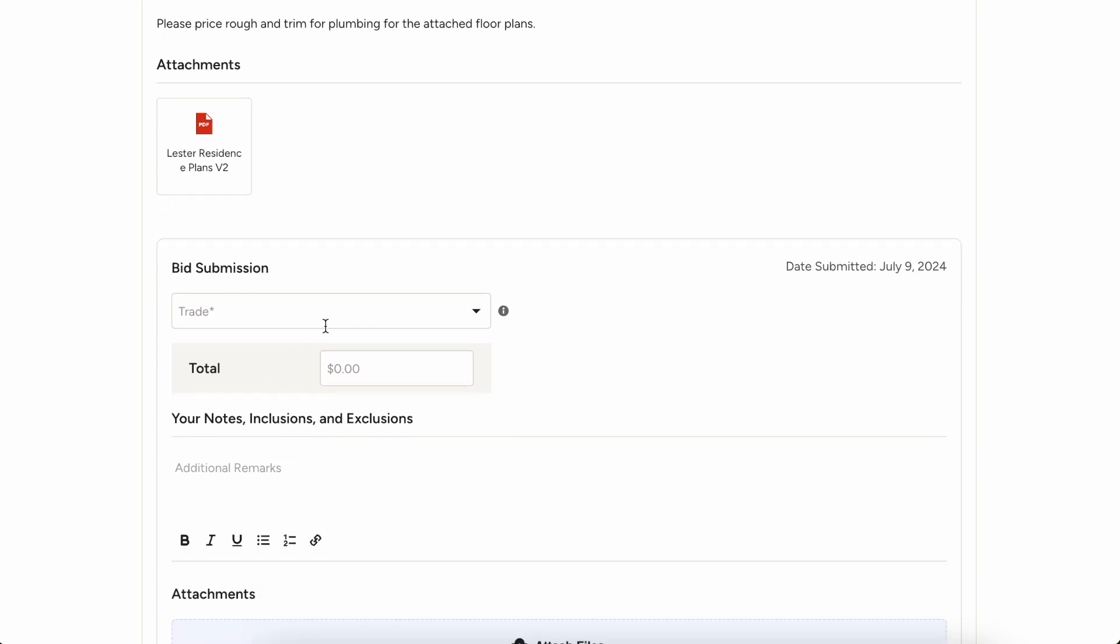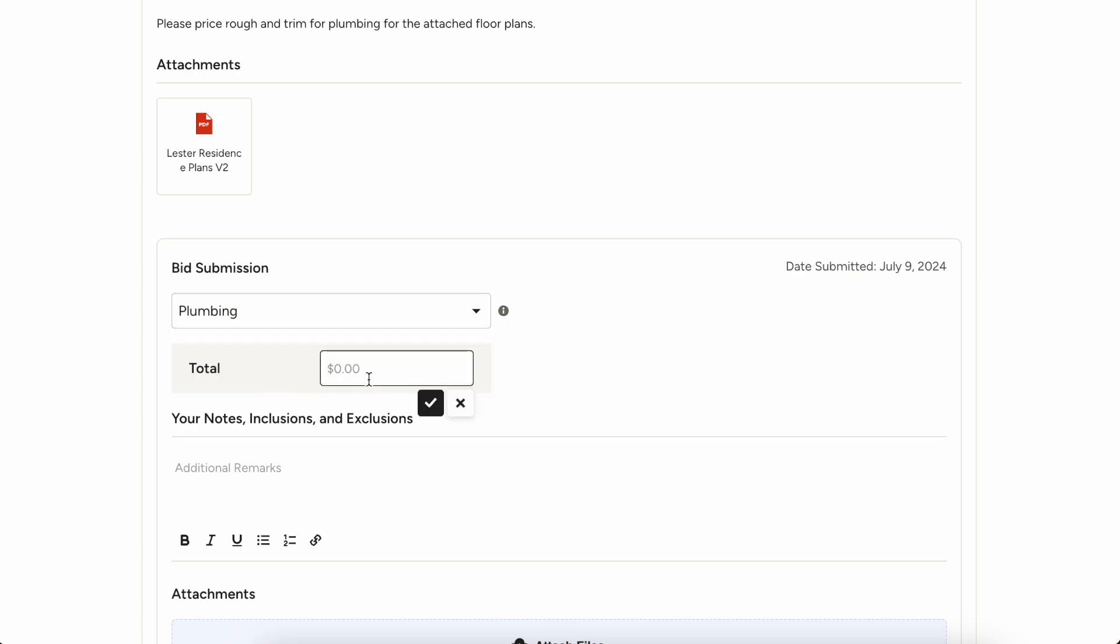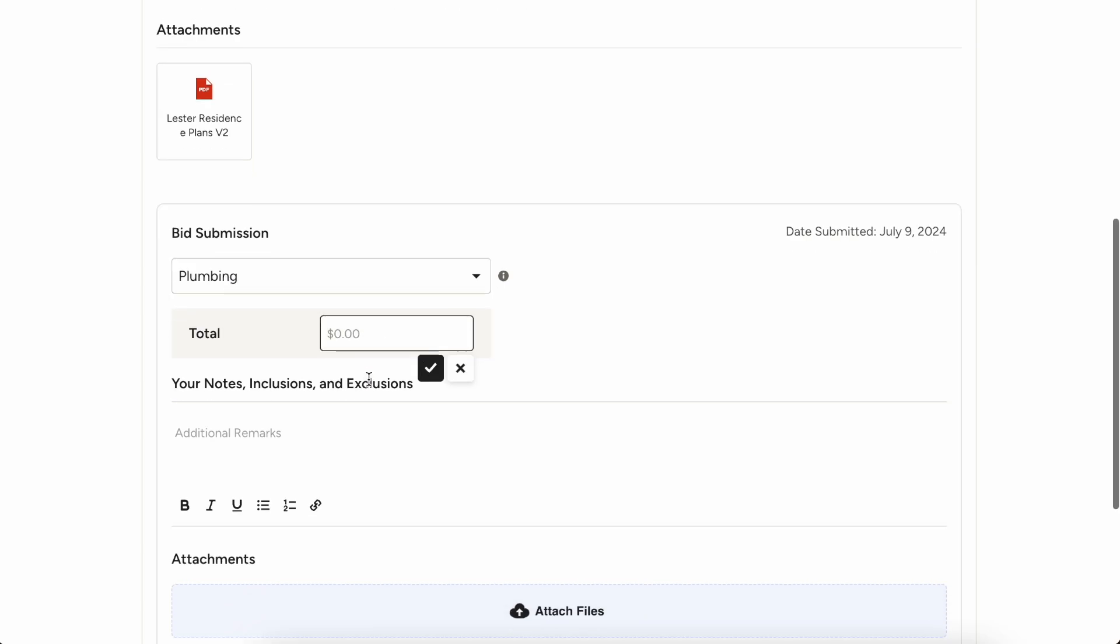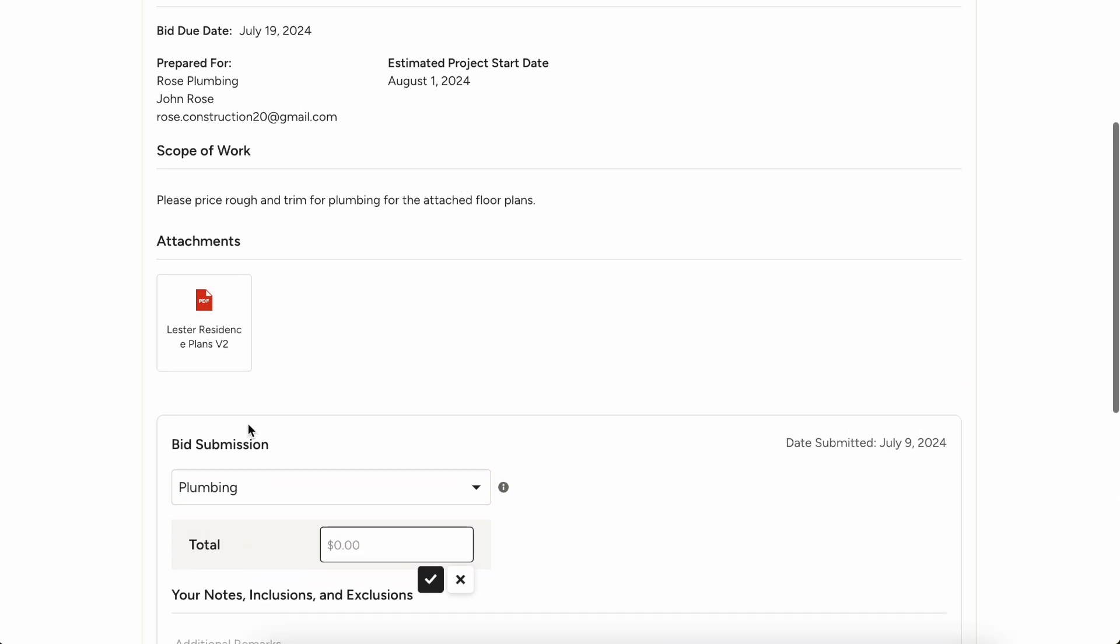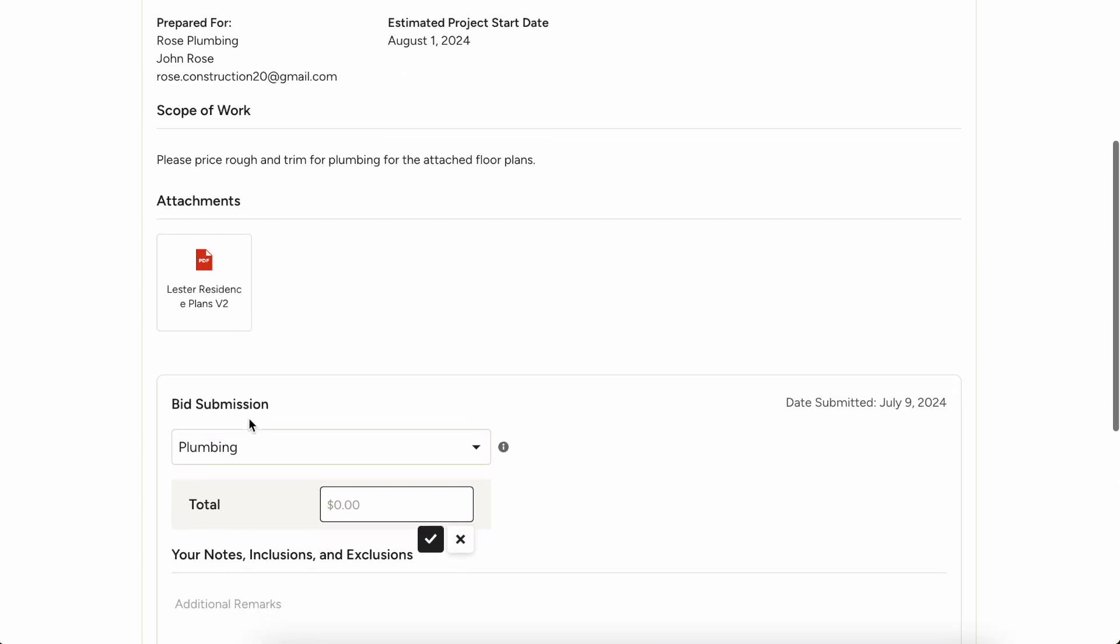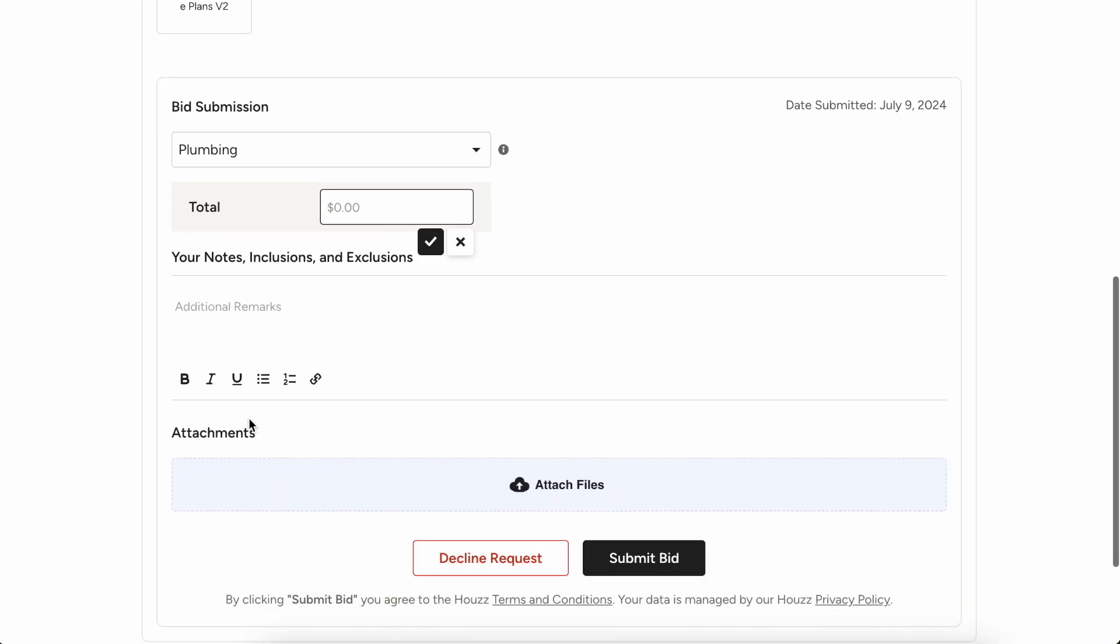If you've requested bids from multiple trades, they'll choose their trade type. They can enter in their total, enter in any notes or what's included, what's not included. Like maybe this quote doesn't include heated floors in the bathroom.